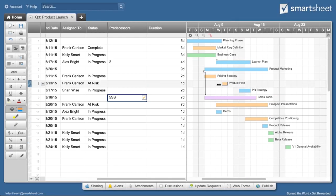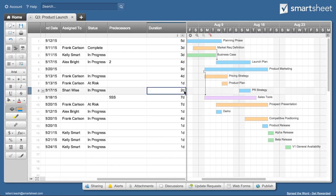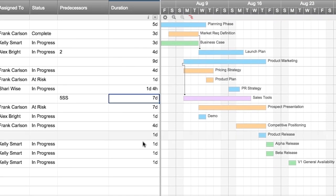You can change task durations by dragging the Gantt bar or by changing the value in the duration column. To set a milestone, make task duration zero.